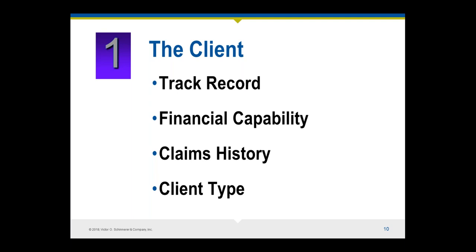Keep that communication going — communication is so important in managing your risks. Other types of clients to consider: is it a public client or a private client? If it's a public client, the funds may be limited. It may be difficult to get additional money if it was the result of a bond being passed. So you need to know that because there might not be money if additional services are needed.